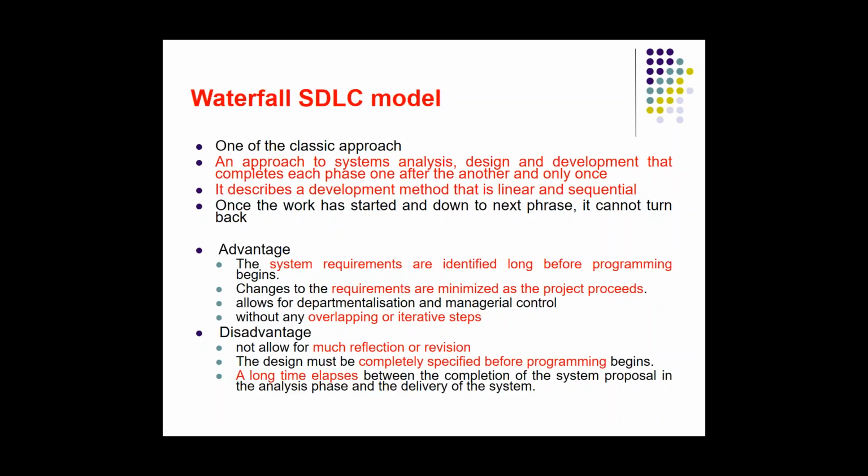It is linear, sequential. Advantage: you have all requirements identified before you do programming. Changes are minimized. You have better control. Not much overlapping and iteration is not there. You don't go back. You're done with the phase, you're done. You move on. You don't go back.